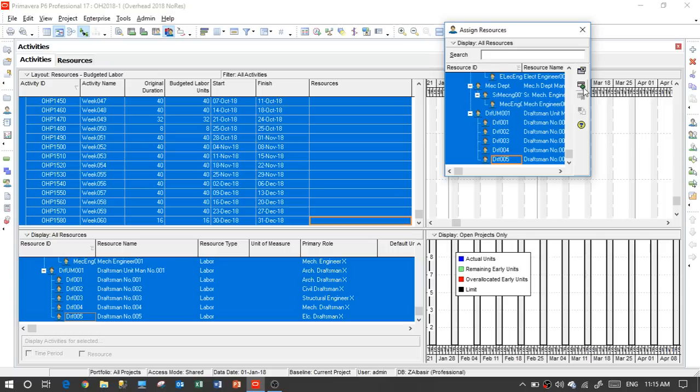If the KPI for the total budgeted labor is, for example, 1,000 budgeted labor units, and when we put in the actuals it is less than 1,000, then it is a good KPI for this week for the organization in total. And we can go one by one through the resources to check their efficiency in how they are doing their work.